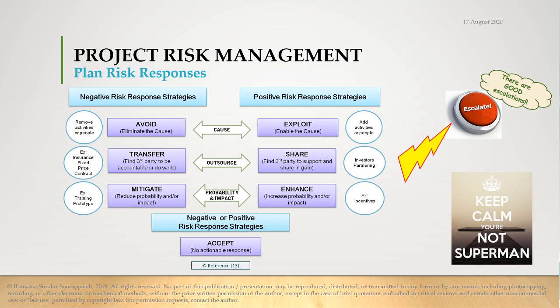Or the same example I gave earlier for avoiding. For example, you are pushing some work packages earlier so that some of the experts who may not be available today, their calendars show free and they can work. But what is the guarantee that will not change? Yes, the other managers are committed that they can lend you these people, but what if you can't borrow them simply because project situations may change? If you do have the opportunity to push some work package earlier, you are increasing the probability of delivering this work package using these experts. Otherwise, you have to run behind them.